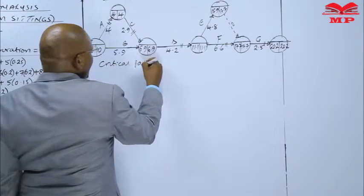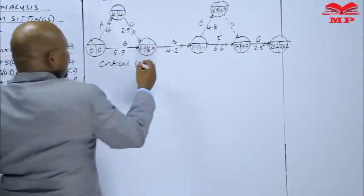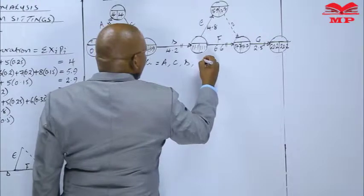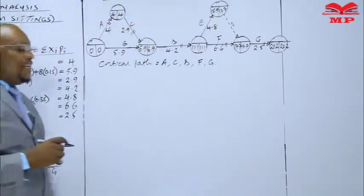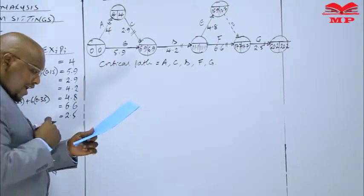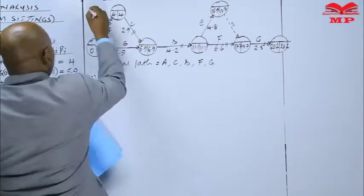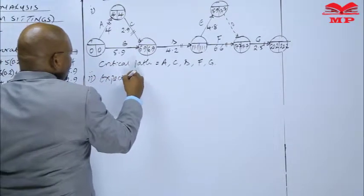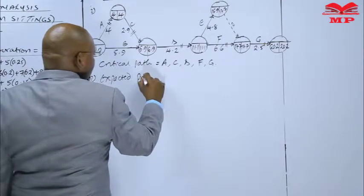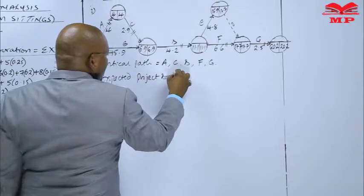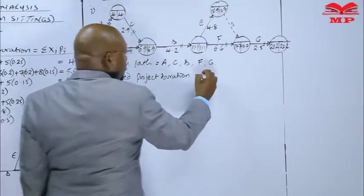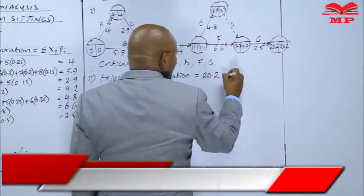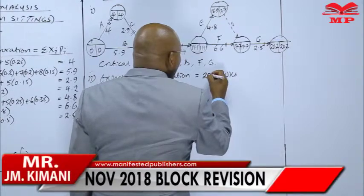So we can now say that critical path, this is actually A, C, D, F, G. Well, now we were asked Roman 2. Roman 2 you are asked the expected duration of the project. This is expected project duration. This is actually 20.2. Were they weeks or days? These are weeks. 20.2 weeks. Now that is how the question could have been answered.